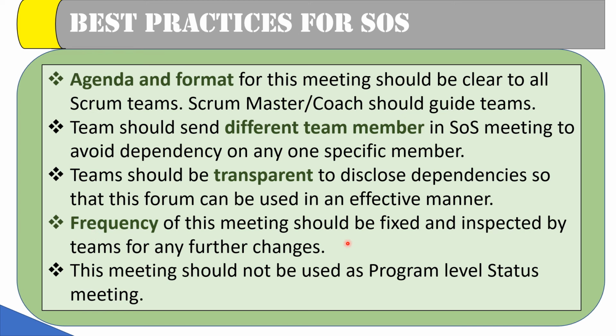Regarding the frequency of this meeting, like I have already mentioned, whether we want to conduct it on a daily, bi-weekly, or weekly basis, it should be fixed and it should be inspected by teams for any further changes. So if the team started in a weekly manner, but feels it should be conducted daily, then everyone should introspect and try to make the changes accordingly.